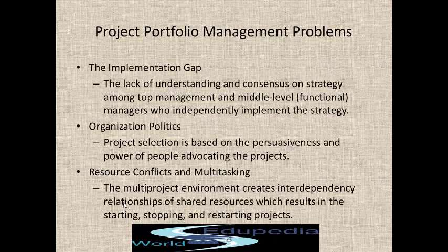So it sometimes results in a resource conflict. They may be busy in another project. Also a person may be doing multiple tasks across multiple projects. He starts the project and then stops, goes to another project, does it, and then comes back and restarts this project. So there is a delay in the project.